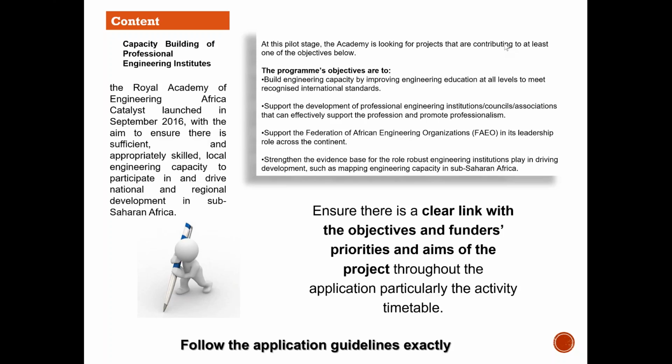Yeah, no, so I understand if the aim of the project that you're submitting needs longer than 6 months, that's not the problem. It's then looking at what activities are going to be happening for the first 6 months with the aim that this is going to go on longer. Obviously, but if you're submitting a proposal that's successful, there is no guarantee that you will get funding in phase 2.